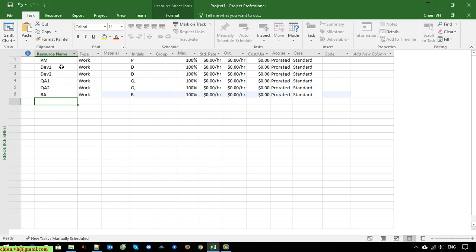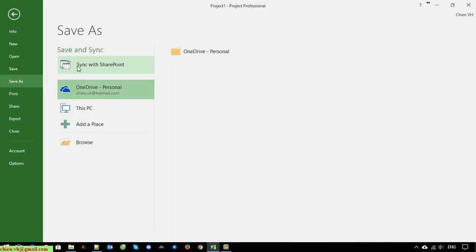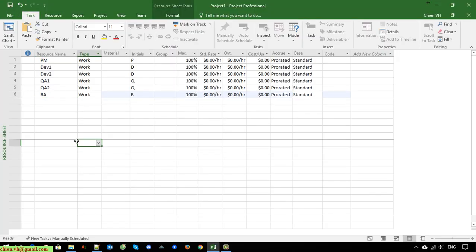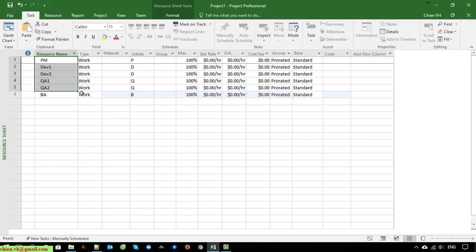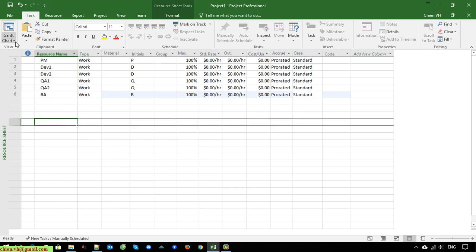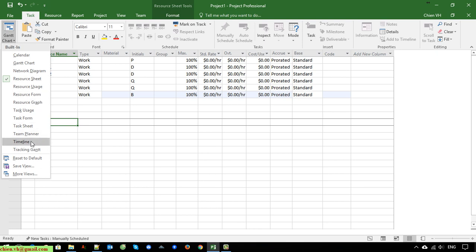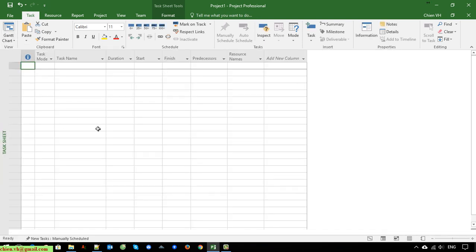Okay, so now we have just finished creating the resources in your project and now I will save this. After we have the resources created, we go back and go ahead to create the tasks in your project, and after that we will assign them to the right person.